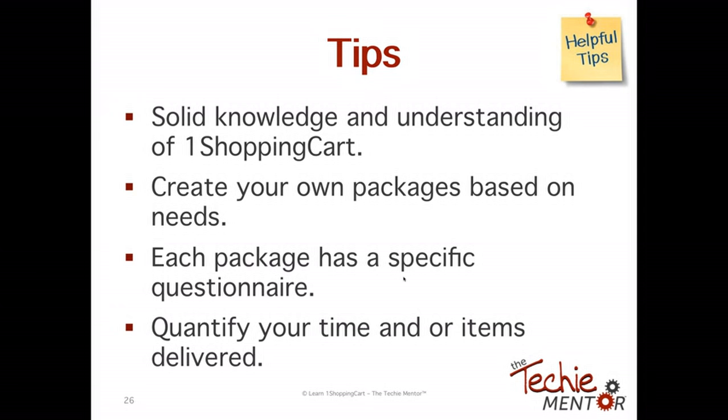Okay. Each package should have a specific questionnaire. So as I mentioned at the beginning, each package will have a planning session, even the management ones, because I want to understand what they want me to do on a monthly basis, and we'll look at their templates and kind of get a gist of what it is they need. But then I would also have a questionnaire that goes with it. So every package of mine had a specific questionnaire based on what I was delivering, because that's what I use to make sure that I deliver what they want. And always quantify your time and or items delivered. So you don't want to just leave it open-ended. You want to make sure that people understand exactly what they're getting, because you're giving them an exact price.